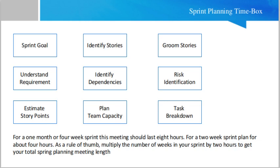Sprint planning is an event in the Scrum framework which is based on the agile concept. For a one-month or four-week sprint, this meeting should last eight hours. For a two-week sprint, plan for about four hours. As a rule of thumb, multiply the number of weeks in your sprint by two hours to get your total sprint planning meeting length.